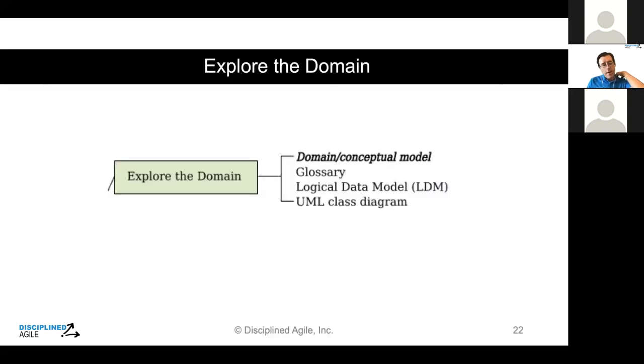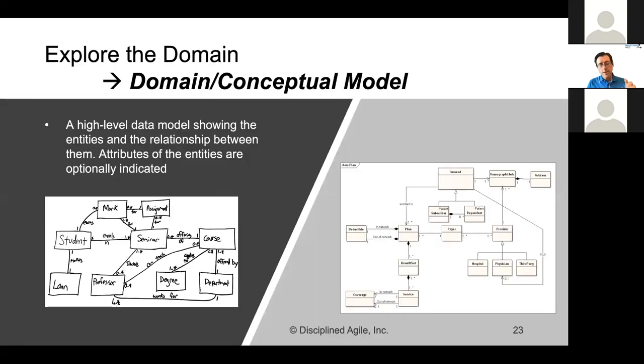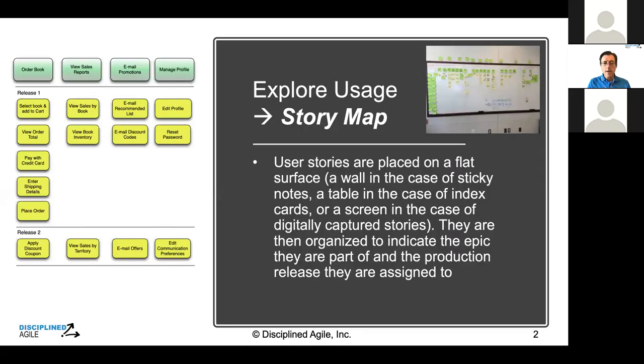Okay, so story mapping, I want to go back to the story mapping idea. This is a very simple story map. There's much more to it than that. If you read Jeff's book, he goes way deeper. The stories, he actually breaks them out into flows, different scenarios, if you will. And if you do it the way he talks about it, these story maps go right around the room and go through pads and pads of sticky notes. And essentially then that becomes a task board, and you start to pick off the sticky notes and you go implement them. And that's how he manages his project.